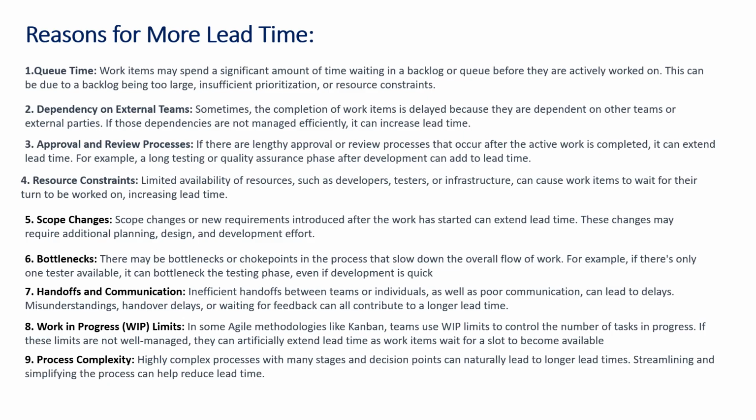Then, as we develop feature 4, the lead time is equal to the summation of all cycle times, where all delays have been reduced to zero. But if you see feature 1 and feature 3, there is a difference in the development life cycle duration, right? The cycle time for feature 1 is more. You would understand why the development has taken more time. If you understand all these reasons, you can improve the efficiency of a project.